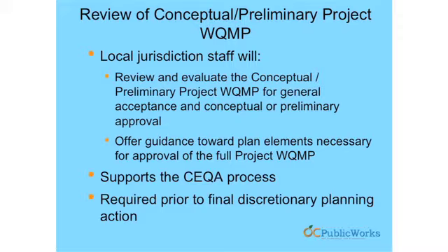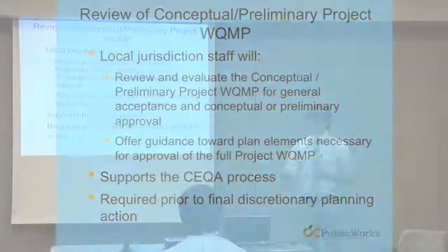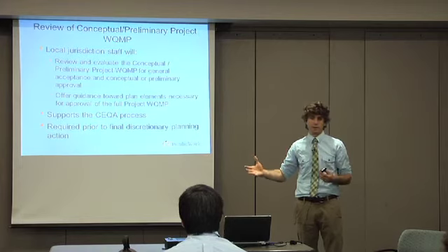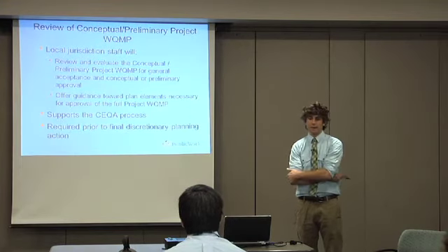It might also just be an opportunity for you to condition things. So maybe they've presented a level of detail that's conceptual, preliminary in nature. They've made the right commitments, but you want to make sure as part of your approval process that as plans progress they're actually going to divide this thing up into drainage management areas. They're going to identify the DCV for each drainage management area, and they're going to show that's done.